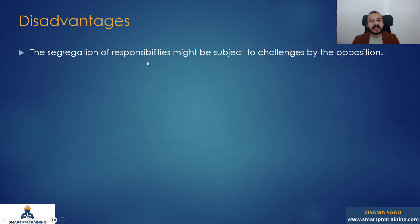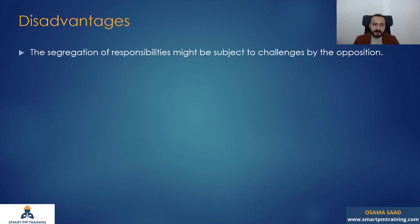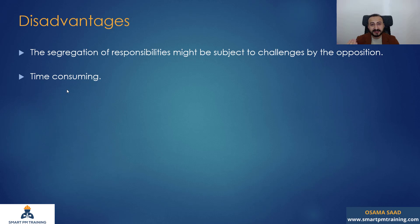Disadvantages: the segregation of responsibility might be subject to challenges by the opposition. The disadvantages are similar to the 3.3, since it's the same process and steps. It is also time consuming — you are going to fill the table and bifurcate many programs. So it's going to be time consuming and costly because you must have the resources and the team to perform this analysis.